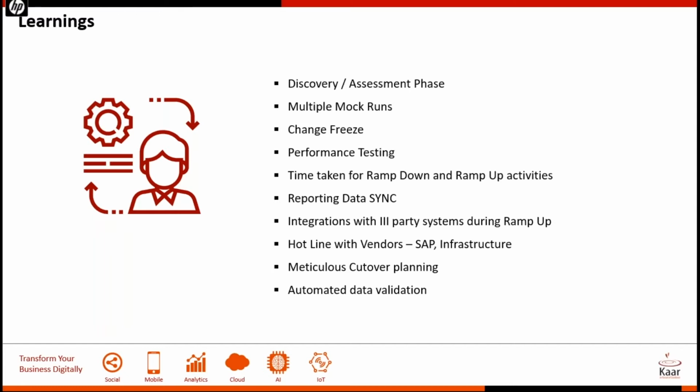So this is the real effective way, and it doesn't have to be 2 or 3. I think it depends on every customer. So depending on the complexity, depending on the size of the database, and depending on the number of company codes and the number of entities. The more mock runs you run, the more comfortable the project team is to touch the production.